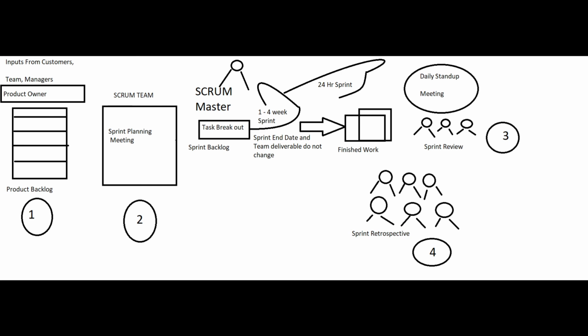We have to provide details like designing the test case. For example, how much time will designing the test case take? Mostly 35 to 40 minutes, and for execution it will take hardly 5 to 10 minutes. If there are any defects it will take 20 minutes, for reporting about 10 or 20 minutes, and for reviewing almost 30 minutes.